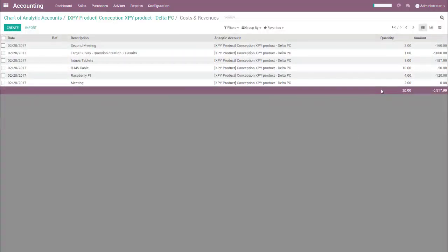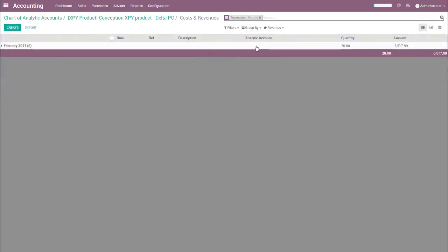If I want to know how much I need to reinvoice my clients, you know that you can have a look here at all the analytic entries linked to a specific analytic account. You have a sum here, but maybe sometimes you will have lines that are related to different months and part of it you already invoiced. So what you can do is group eventually by month. You will have the ability to have the global amount for this month, and it could give you an idea of how much you could invoice. But of course, this is how much it cost you till now.